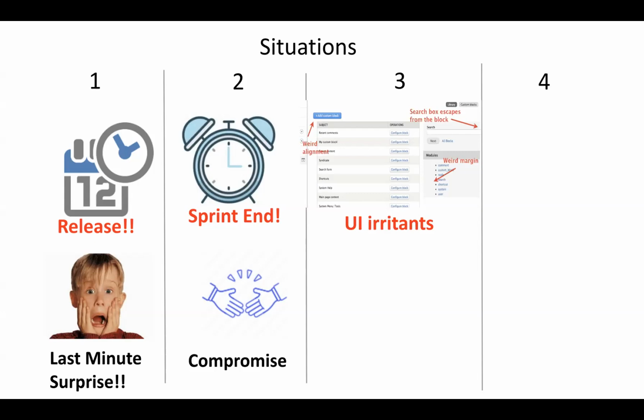Because these issues are very trivial, they should not upset the estimates of these stories. So what happens is that you are essentially still doing the work and counting it as an acceptance criteria for the upcoming stories. And you're going to do it soon because you're putting that in the stories that are coming in the next sprint.